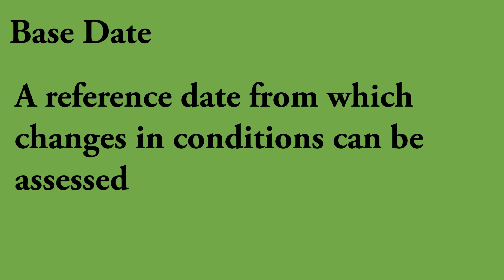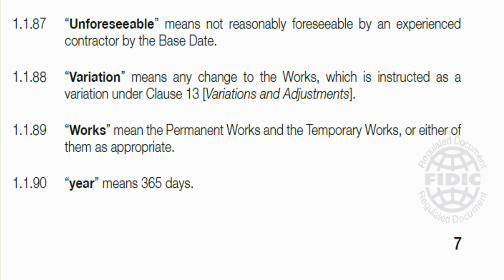To explain a little further, I'll link this to another definition: 'unforeseeable'. It says unforeseeable means not reasonably foreseeable by an experienced contractor by the base date. So this base date is clearly connected with risks.